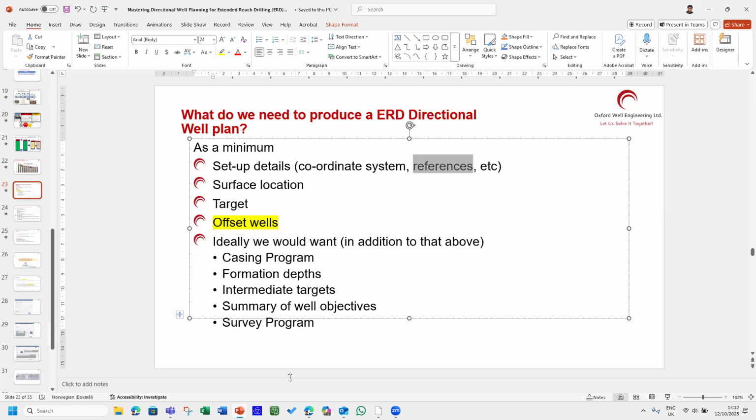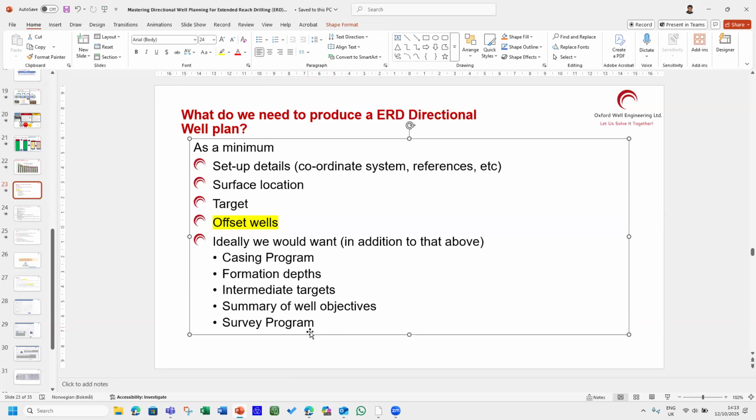When you show your work, you should be relaxing, not worrying that you will have big problems. So be aware of these inputs, correct inputs that you have references for, and how would you actually ensure that these are correct? You have a sign off. You receive information from the customer or someone who wants to do this, your manager, whoever, keep track of these emails. Write it down into the QA QC forms.